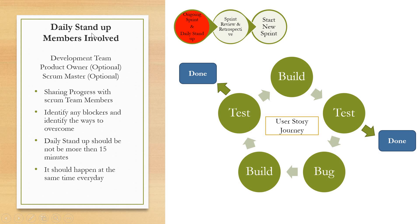Every day there is a meeting called the daily stand-up. Members involved are the development team; the product owner and scrum master are optional and not mandatory unless required. The objectives of the daily stand-up are: team members share their work progress with other members; identify any blockers and the ways to overcome them. The daily stand-up should be no more than 15 minutes and should happen at the same time every day.